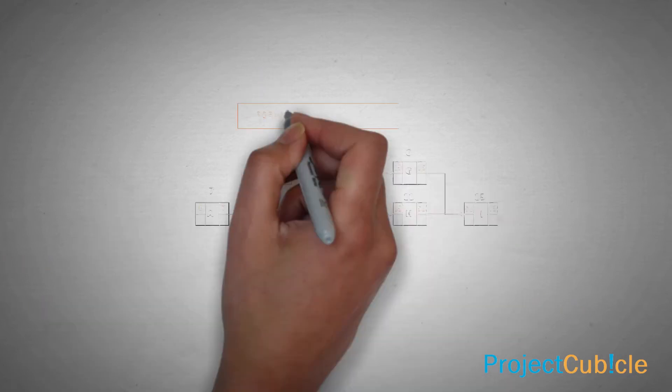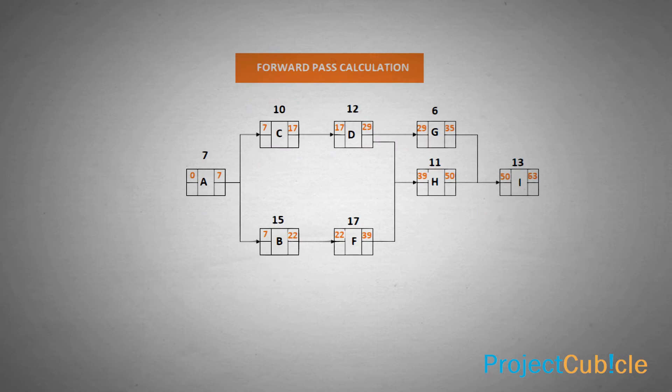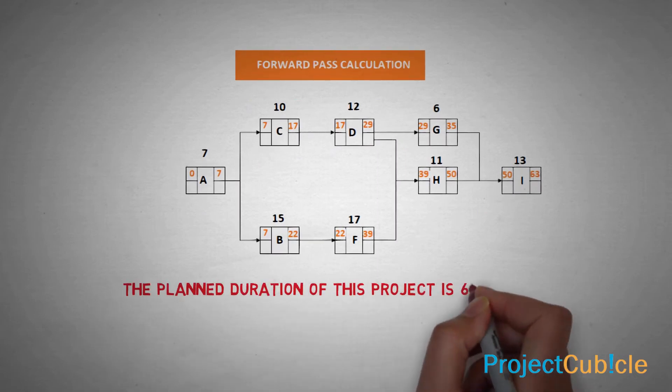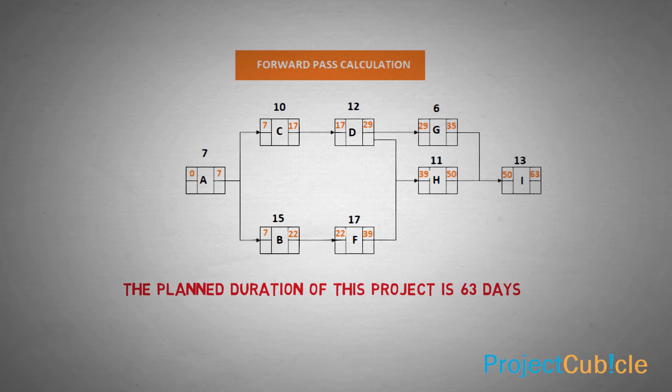After completing all the earliest date calculations, we will know that the planned duration of this project is 63 days. In order to determine the critical path, we will make backwards pass calculations.